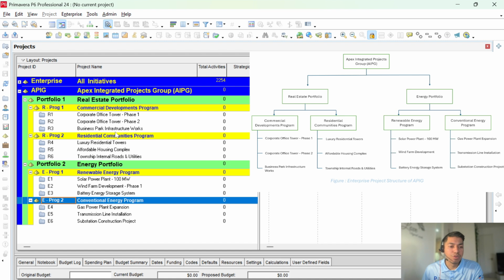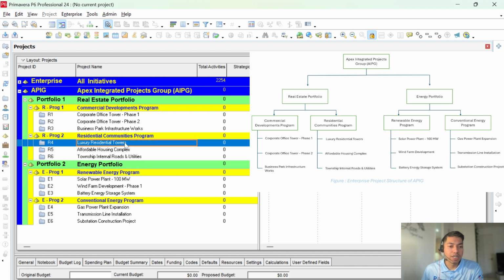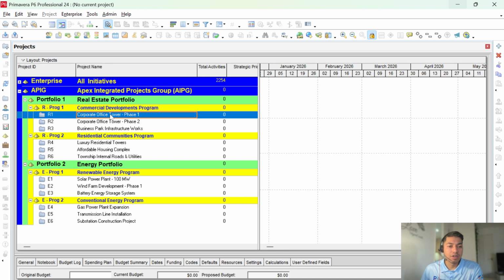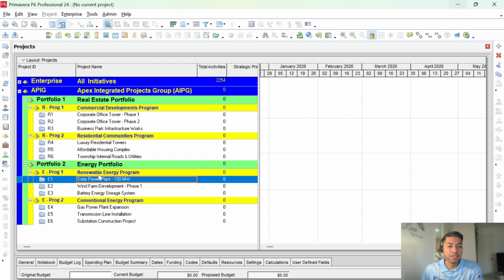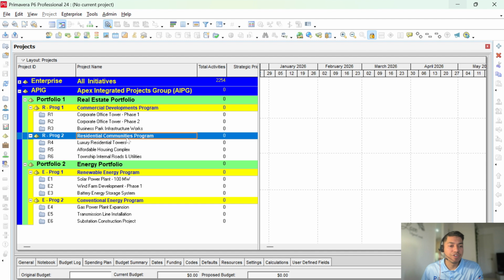Now, if any new project comes under this company, it will be easier to categorize where it fits in, and we will just introduce a new project there and place the project name. So EPS is something which is used to categorize the projects under a company. Lastly, I would like to add that project is the lowest node of the EPS, and every project that comes under the company needs to sit under one of the EPS, whether that is the renewable one or the residential, wherever it fits in. We will add the project under that portfolio.